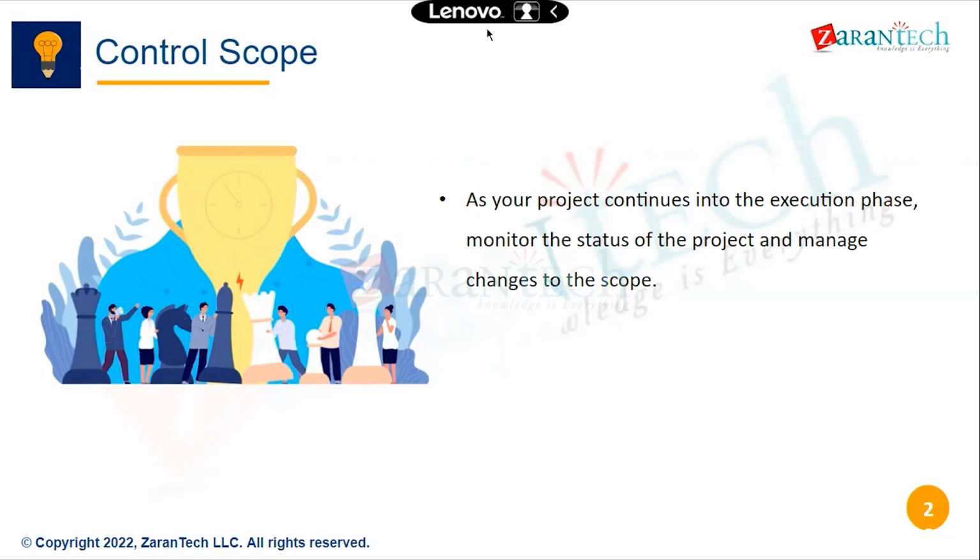Right? Therefore, once your requirement is signed off, you will have to raise a change request. Then once you get the change request, it again goes to the change control board. And what is its impact in terms of time, cost, or business impact? All that you're going to analyze and then take the approval. Right? Therefore, this is again a cyclic process. Therefore, how are you going to get it approved, and how do you implement this change and give it to the end users?